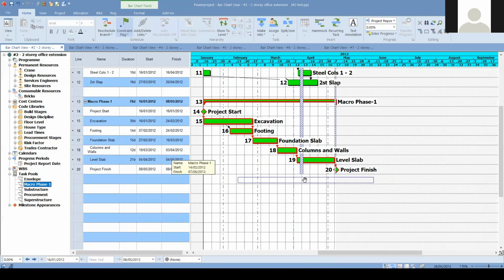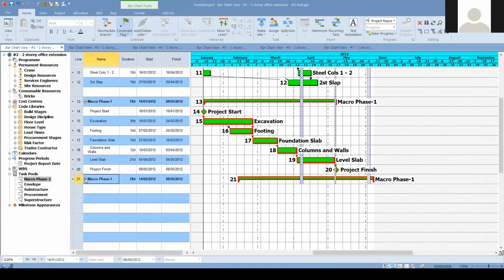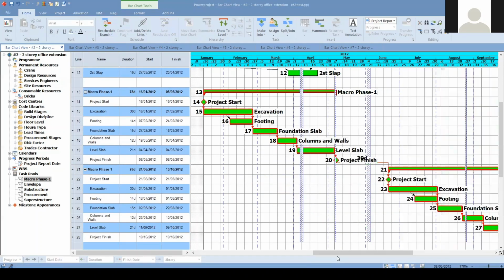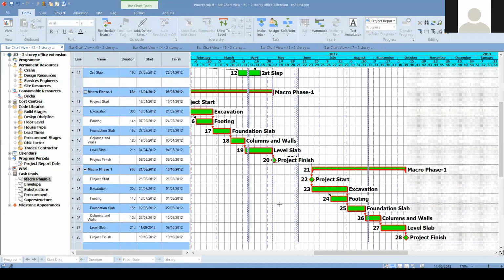You can drag and drop, all the information will be with you, and then you can have the linking, like we can say, okay, after 30 days pass, this second phase can start. We can quickly create our projects with every piece of information according to this. So we can change this one to, let's say, phase 2.